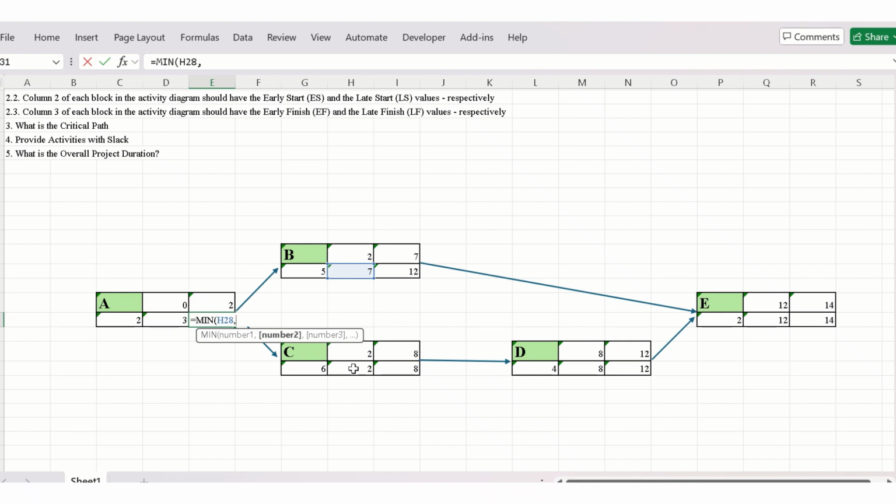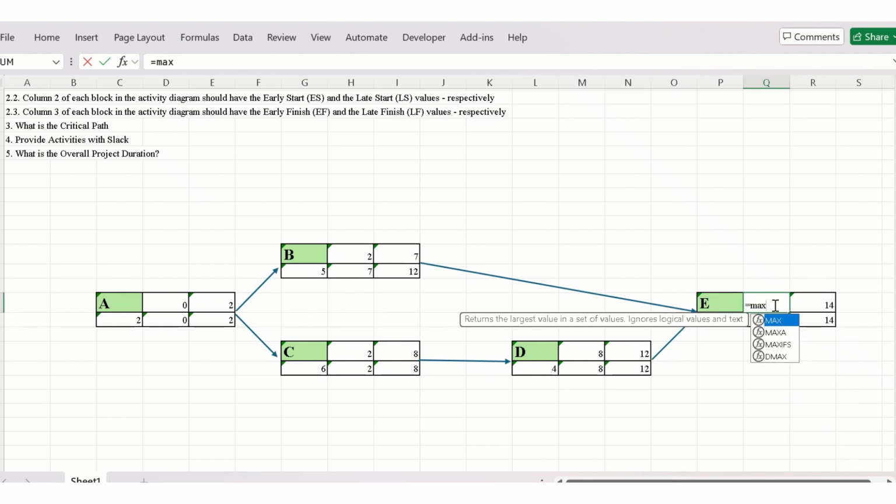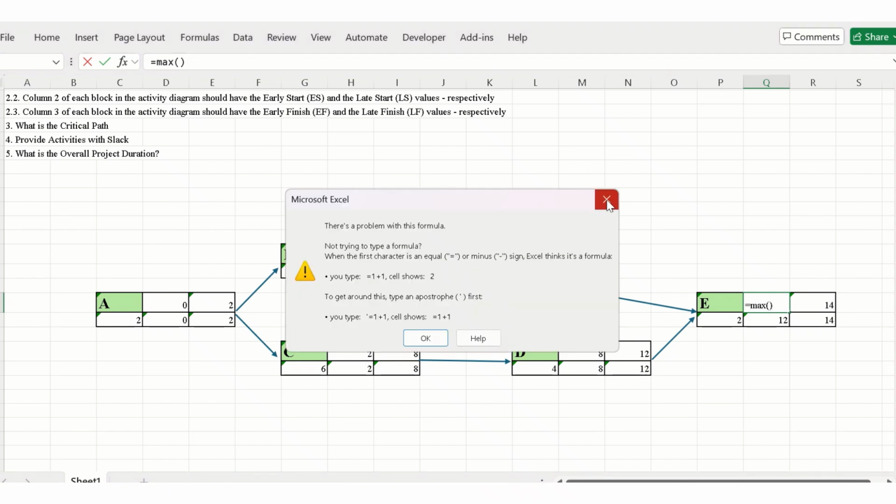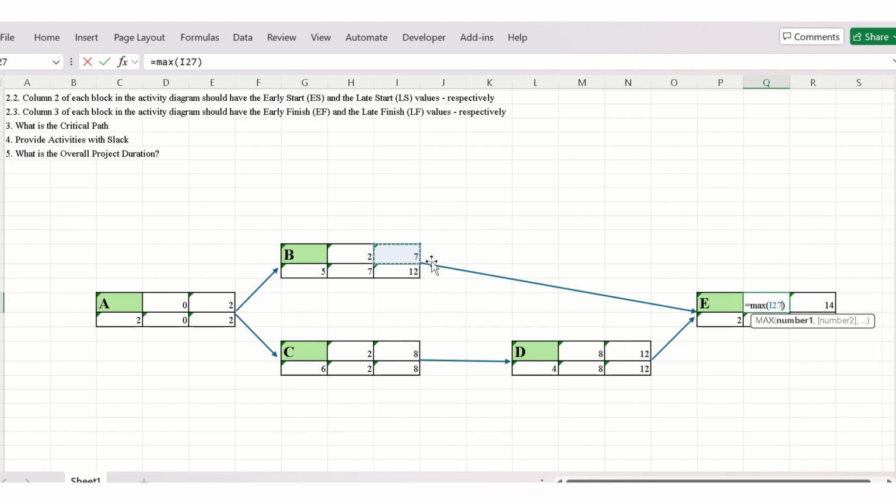I think that I made some mistake. I hope I didn't. It starts at 0. I think that's more common. Also, when I'm going forward here, the start should be the max, because before you move to the next node, you want the other one to be finished. Both of them are required for whatever next thing. Max between the finish. Okay, what am I doing wrong? Putting the finish, it finishes. So it doesn't change anything, but it makes it more dynamic.